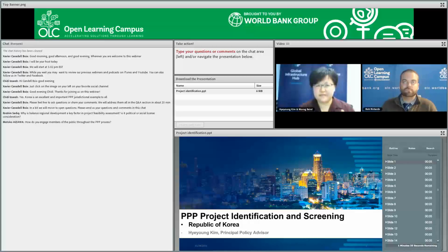But the PPP project feasibility assessment and the BFM assessment are not published through PIMAC's website, because the Korean market has many unsolicited projects, so the analysis result can be related to the commercial interest of a private party's proposal. So that's why we do not publish the BFM assessment through our website.